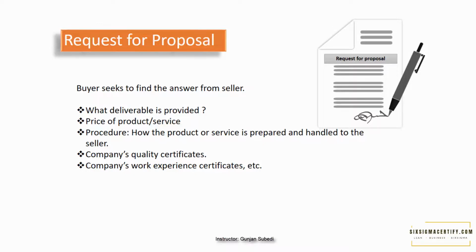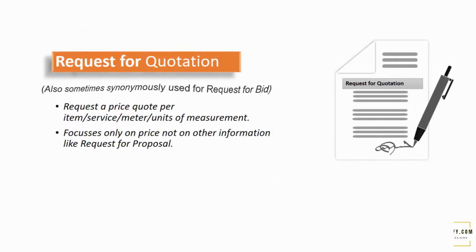We have another document, invitation for bid or request for bid. This is the request for total price to do the work. Several sellers are sent the request for quotation or bid and the best is selected.